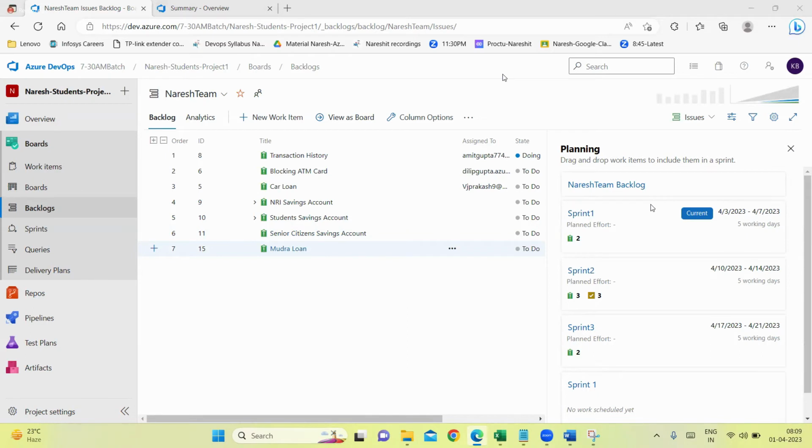Order of creation is like this only, Ritvik. How we have created from the beginning of the classes, it will be like that only. Work items will be created by the product owner. Sprints will be created by the Scrum Master, and work items will be assigned to different sprints by the Scrum Master by discussing with the product owner, business analyst, and all. Then the DevOps engineers and developers will start working on the different work items.